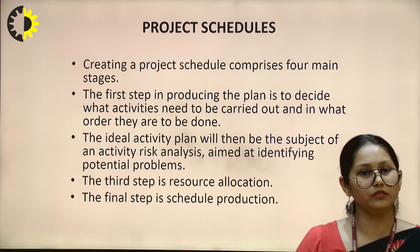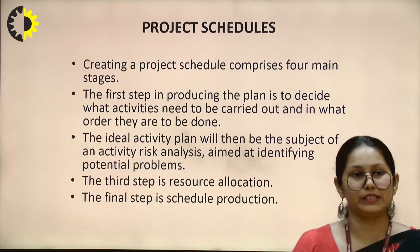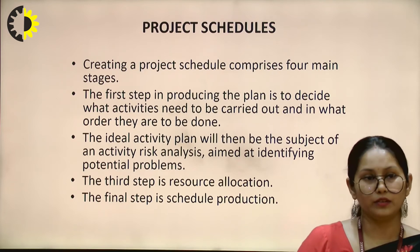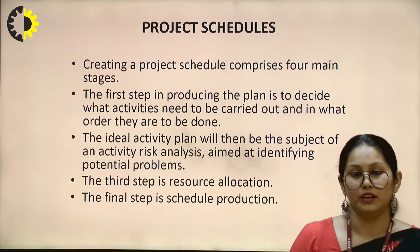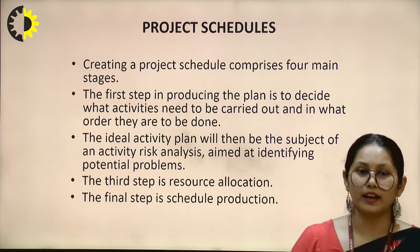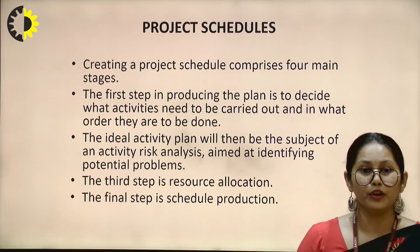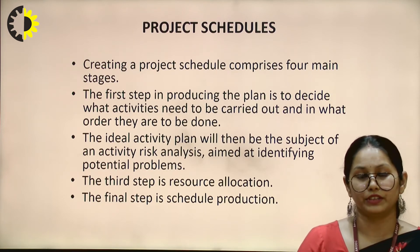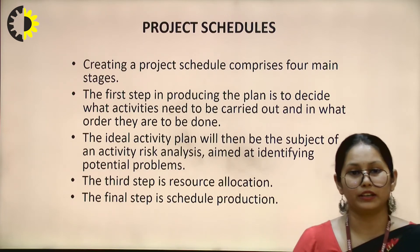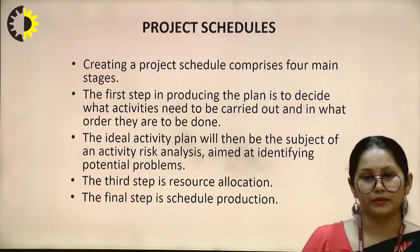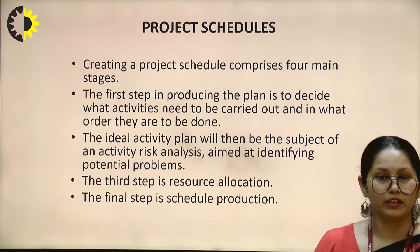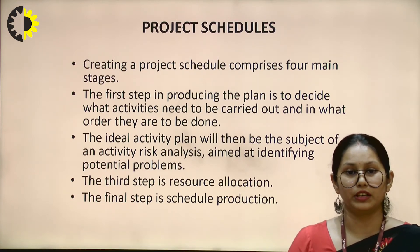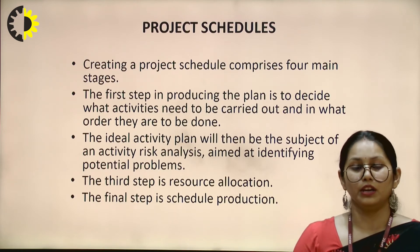A project schedule comprises four main steps. The first step is producing the plan — deciding what activities need to be carried out and in what order. We identify the activities that need to be done and in what sequence they will be completed. Activities such as risk analysis are potential activities that need to be identified at an early stage, so we find out which activities could create problems during implementation.